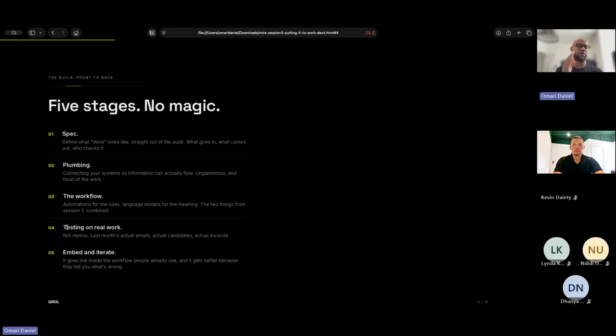So for example, maybe a preliminary test on the most basic of functions that you're building, then an expanded test when you've plugged it into more of your working systems, and then maybe a holistic build test where you measure it in a real workflow against edge cases, and have potentially members of your team working on the solution in the final test phase so they can submit feedback as well.